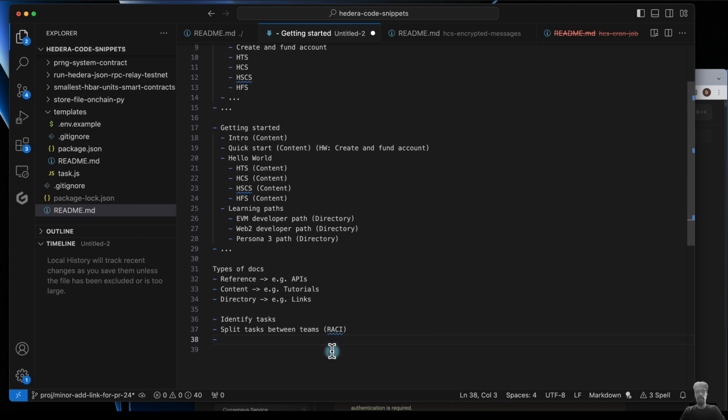Okay, then break into stages. This is important because each person working on the tasks can only work on one task concurrently, at least to be effective. The different teams can work concurrently, but there are prerequisites and post-requisites for each of the tasks, so you need to make sure they line up properly. You could go full-on Gantt chart with this, but I feel the complexity of this project doesn't really warrant that. Just breaking them up into stages is sufficient.